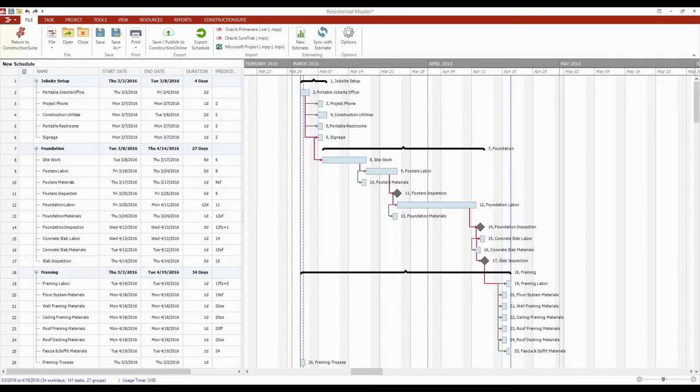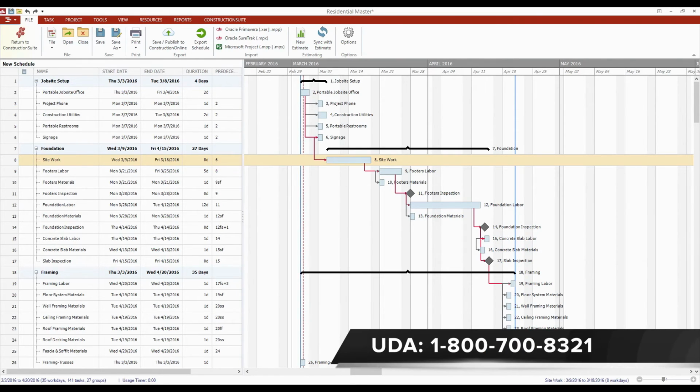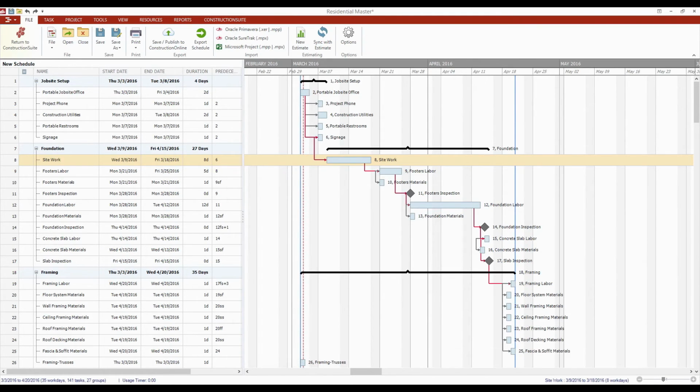I would recommend, too, that if you need to make any further adjustments, you can always come over here onto the Gantt chart site itself and actually drag and drop these tasks around as well. It's going to allow you to move these tasks as often as you want, and the predecessors are not always going to force your tasks to start at the earliest possible start date. This is because the default setting for most of your tasks in ConstructionSuite will be to use soft predecessors, or soft dependencies rather, and that means that the predecessor relationship sets the earliest that a task can begin. The task can be a little bit longer, however, or it could start a little bit later, however, if needed.